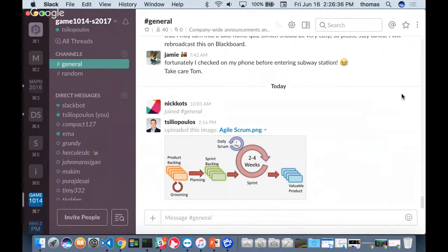And they usually have some kind of weighting associated with them. Usually we call them story points, right? The story points are a number of hours or number of days, depending on what organization you're working in and how complex the feature you're building is. For us, let's say it's a number of hours. So let's say this idea of the user understanding that he's getting hurt is worth 4 hours. We assign a value of 4 to it, right? Okay, cool. So I have this one user story, and it's going to go on something called the product backlog.